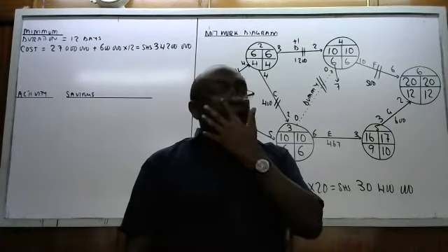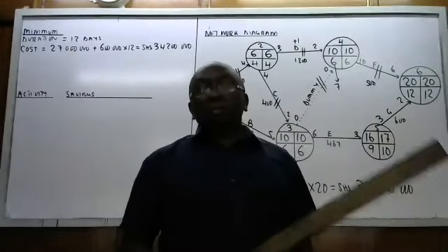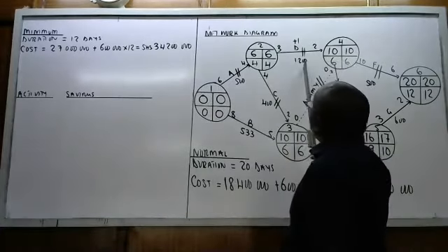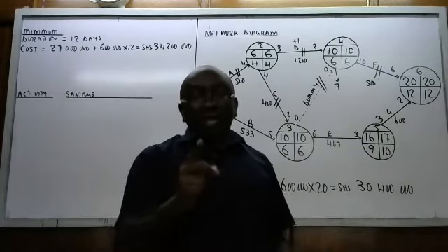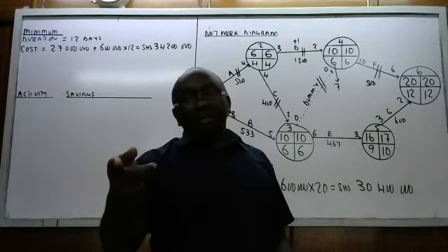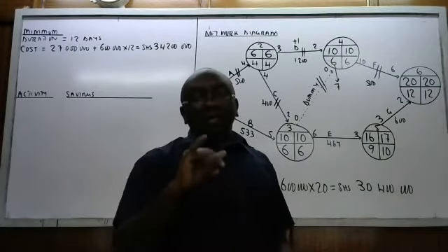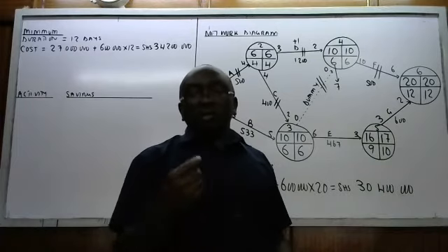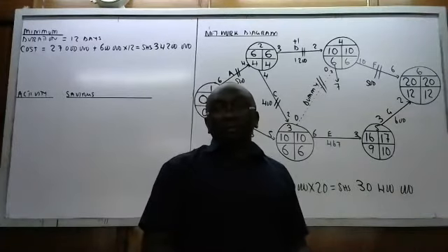And that is the point at which I have said, identify any activity whose slope is more than 600. Like now, this one D, which we have identified, it means if you reduce D by 1 day, you save 600, but you will have spent 1200. So it does not make economical sense because you end up spending more by 600. That's why we had crashed it, although it was critical. Eliana, is that okay?